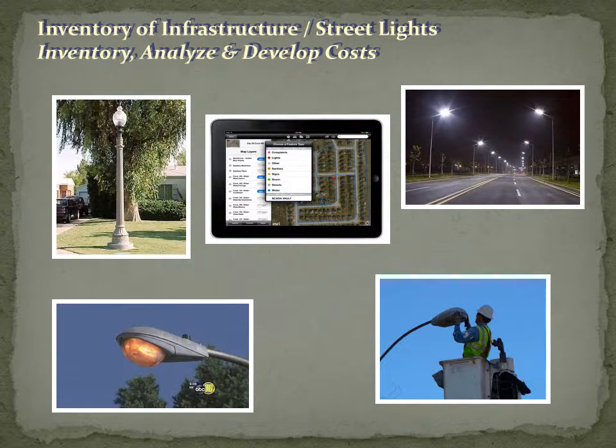An inventory of all streetlights would also be proposed. The information would include GPS location, condition, hardware, and type. Analysis of all lights would then be done and a 5-year plan for replacement with more modern and cost-effective types of lights and bulbs would be prepared, including costs.